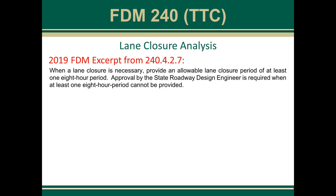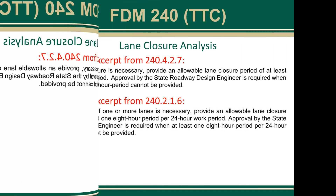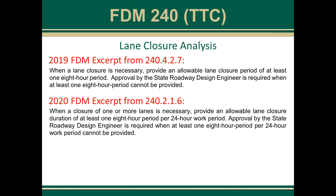Lane closure analysis — this is the 2019 FDM excerpt from 240.4.2.7, requiring that an 8-hour period be provided for contractors when they're going to be utilizing a lane closure. The 8-hour period is still required in the 2020 FDM; however, the language has changed to make it clear that the 8-hour period is required for the work that is supposed to be covered. So if a double lane closure is necessary to perform the work, that 8-hour period should include the double lane closure — it shouldn't be starting from just the single lane and then moving to the double lane.